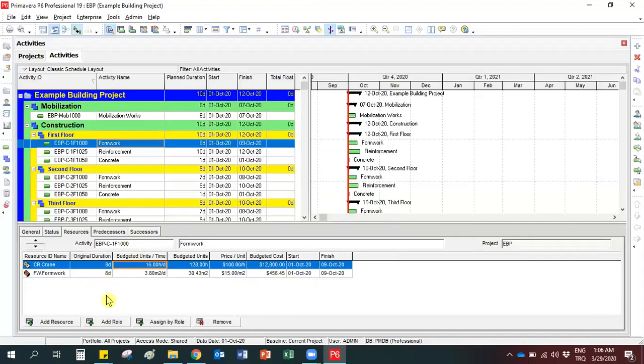So as a general summary, for labor and non-labor resources, the type of data we have in construction works is more suitable to be written in terms of daily amounts because we know the number of resources. But for material resources, the type of data is more suitable to be written in terms of total amounts because we know the total amount given by the quantity takeoff. So you should use this logic while assigning your resources to the activities.